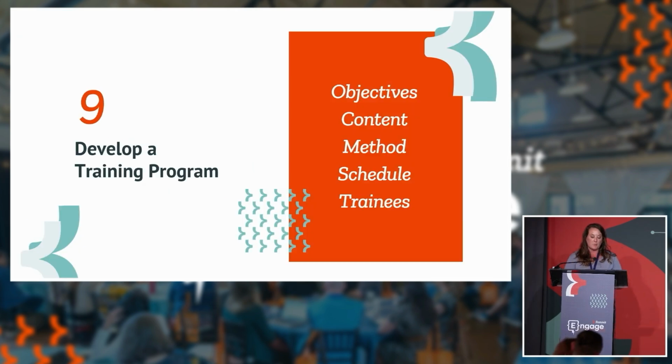Number 9, a training program. How are you going to train within your institution? Defining who, what, how, when, all of those things are key, so make sure you've established those. We are going to be using our LMS to create training modules so that employees we've identified as going to be super users go through these training modules to learn all the different components of Element. So figuring that out, establishing those people, and allowing the training to begin, the earlier the better.